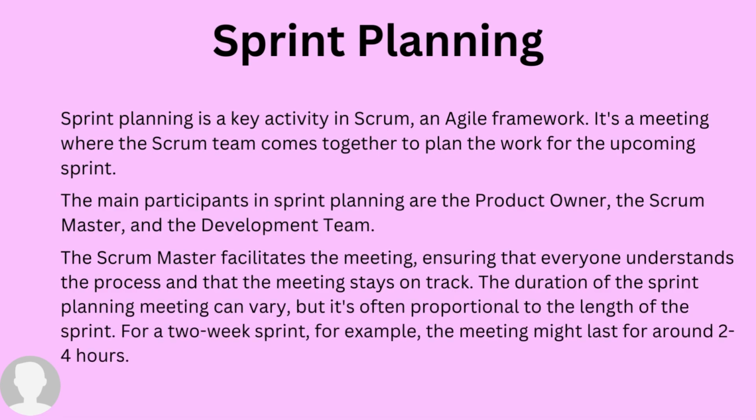Sprint planning initiates the sprint by laying out the work to be performed for the sprint. This resulting plan is created by the collaborative work of the entire team. So, the key players in this ceremony are the product owner, the scrum master, and the development team. This ceremony usually takes between 2 to 4 hours, depending on the length of the sprint.